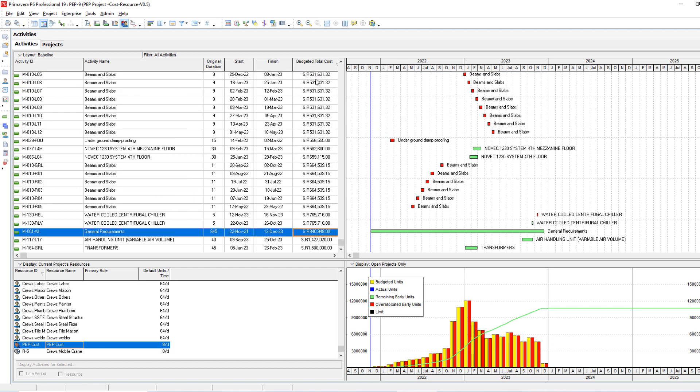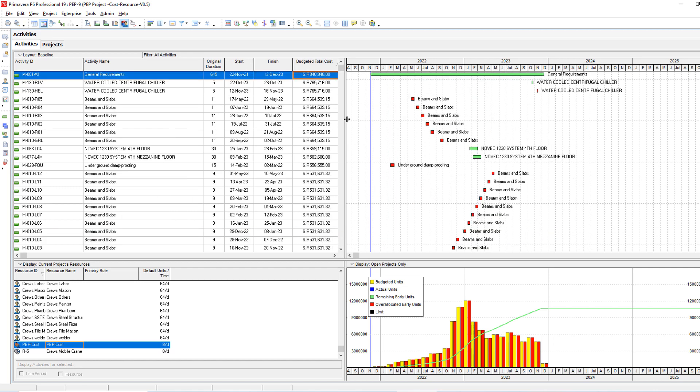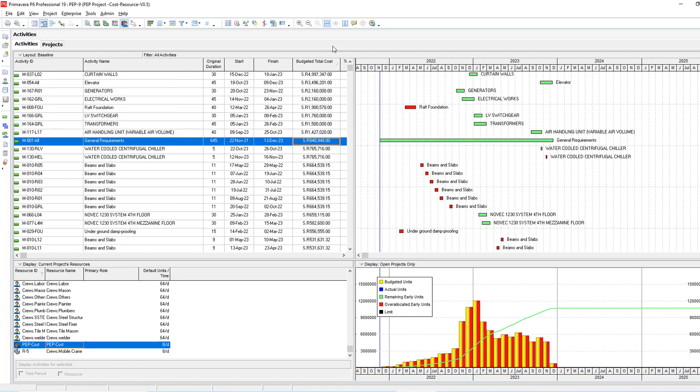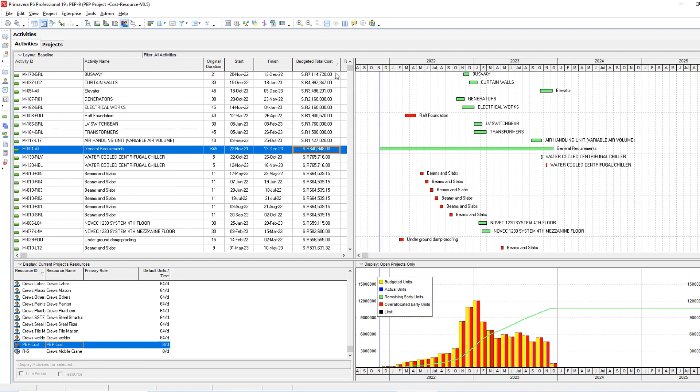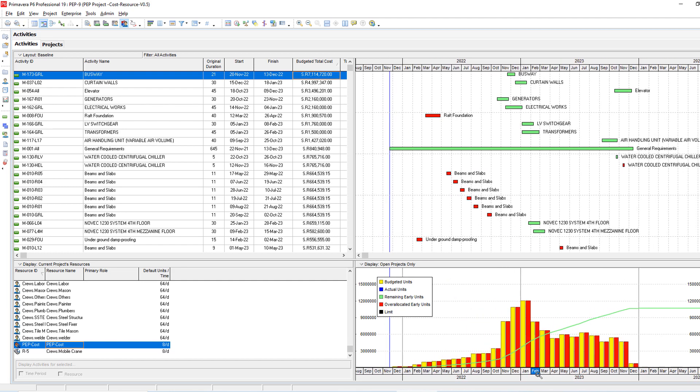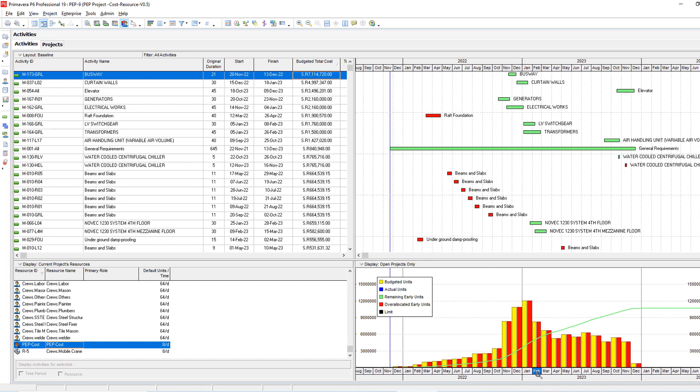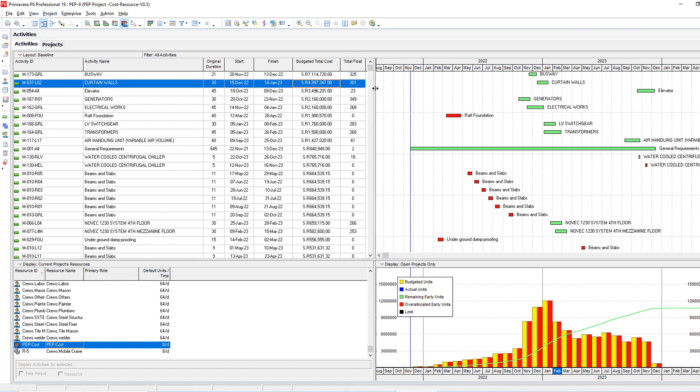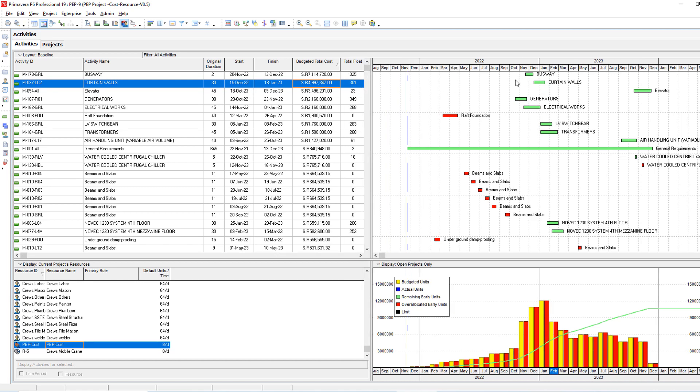Now I'm going to sort the activities from the heavy one to the light one, so in the top I'll find the most heavy activity I have. I have a problem in the month of January, so here I'm going to see what is the activity in the month of January. Here I have also the total float, which means this activity can be delayed a little bit without affecting the project.